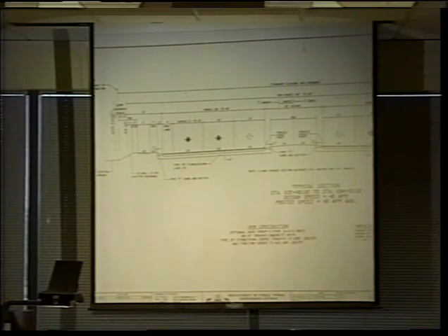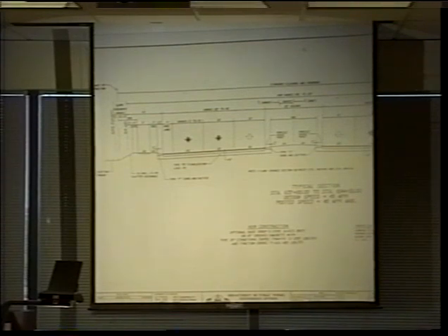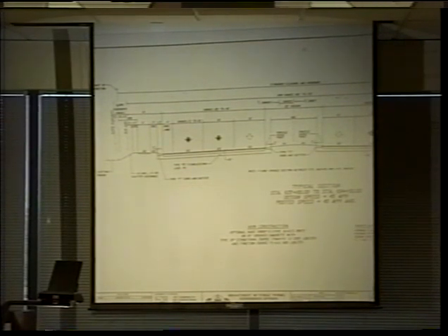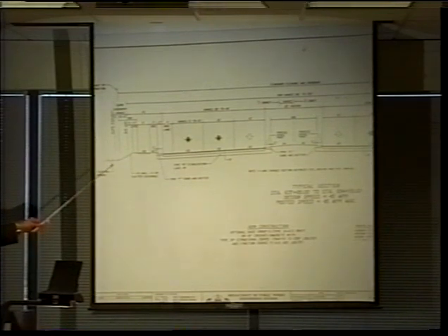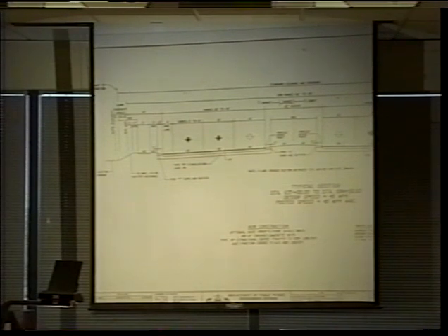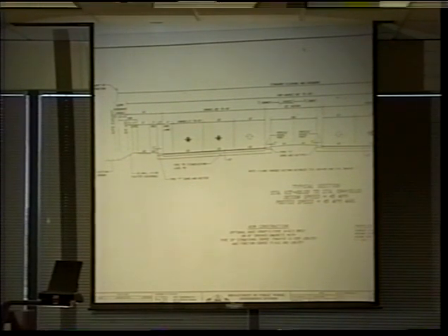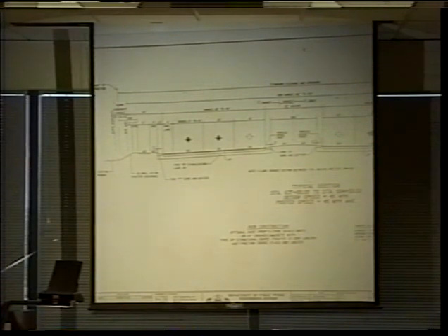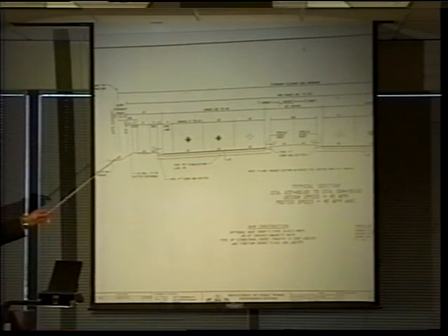This roadway is being designed currently. This is on the boards right now. So one would expect that the topographic information that the designers have relative to adjacent property is fairly current. Roadway plans that are designed, that are in line for construction today, many have been on the shelf for several years. And so the adjacent property conditions may have varied, and it no longer applies. So this condition, the slope recovery to meet and match at a property line, may or may not work. You need to evaluate that.